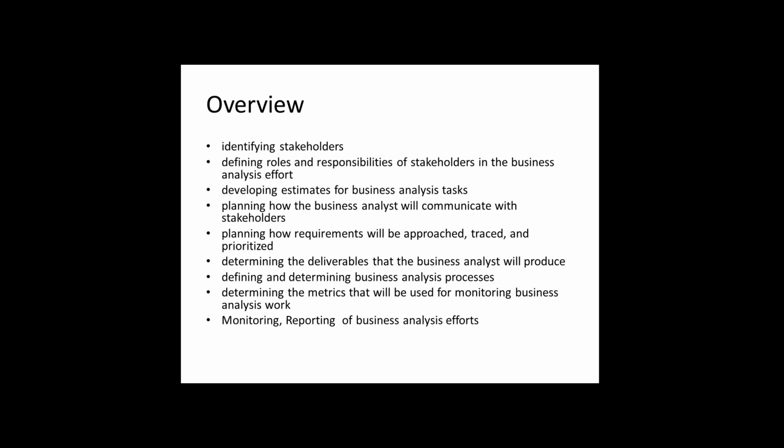This part is very critical, because if you miss any of the parties in the second item, those you may interact with, then at one stage you may realize that the project is not up to the mark. For example, you are building the system and you missed consulting one of the partners. Then at a later stage of the project, if the partner comes with a particular requirement, you may find that you need to modify your system, and it will add to your cost and to your testing efforts and all other aspects. So at a very high level, you have to be informed about all these parties.